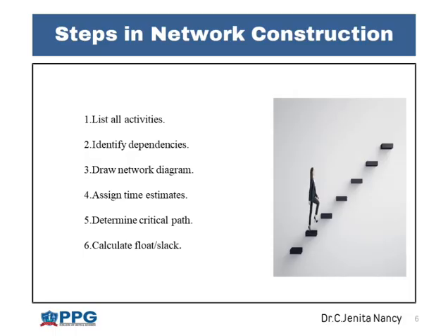What are the steps in network construction? The first point is list all the activities, identify dependencies, draw the network diagram, assign time estimates, determine the critical path, and finally calculate the float or slack.